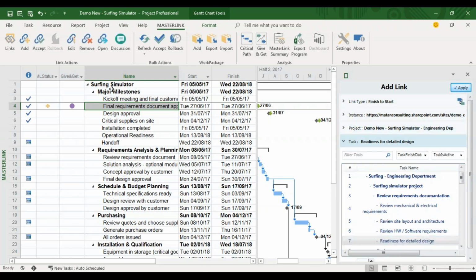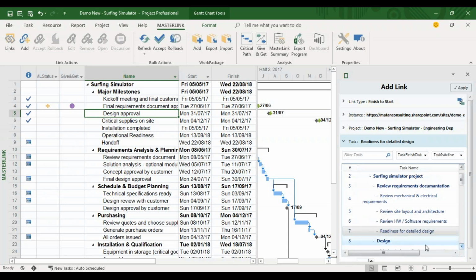And what I've done now, as you can see here, I've created a new link. This does not yet mean that I've changed my work plan if the case requires. It only means that I've established a link and I've brought new information. And from here, I could go on to create new links. Let's say I know that this task here also links to the same project, and in this case, it's a summary task, and I can create a link here too.